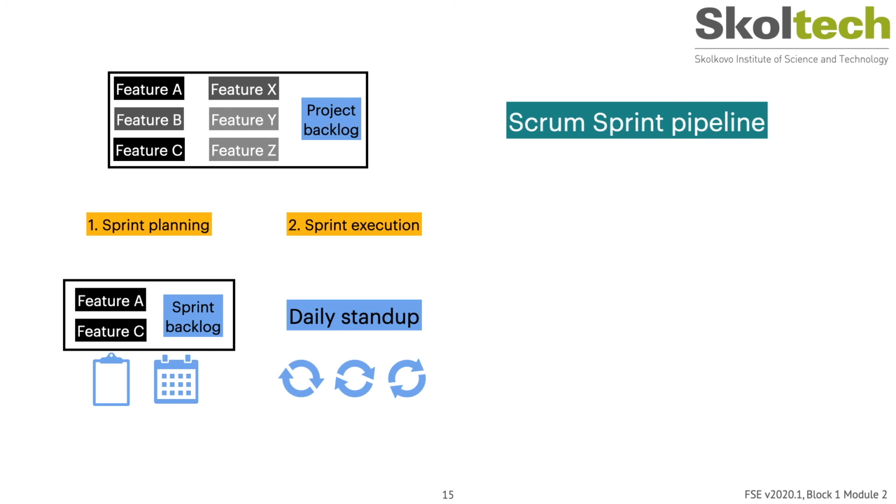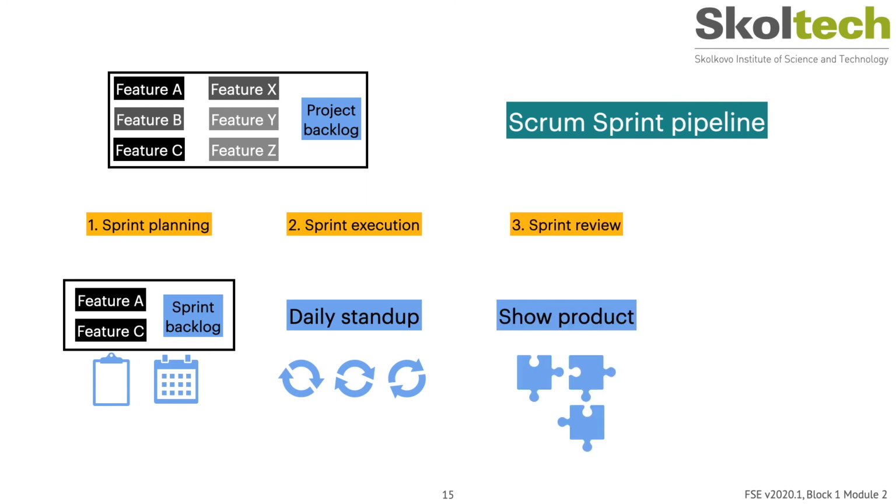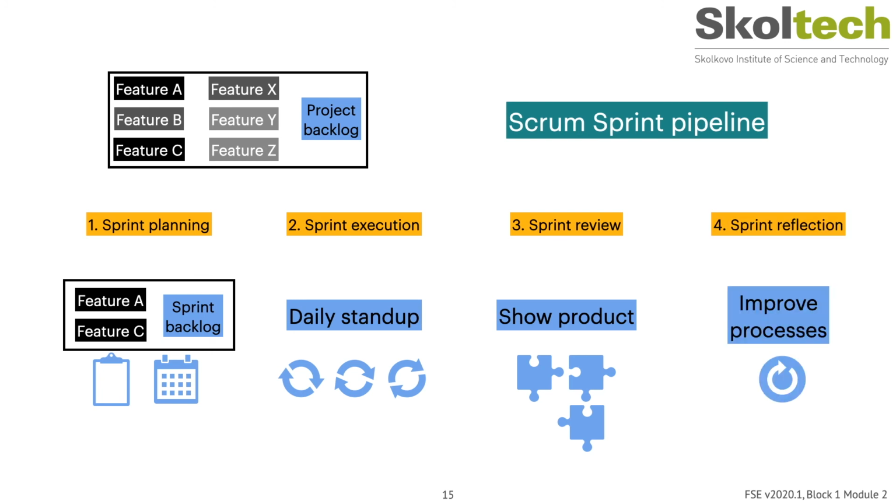As the sprint gets to its completion, a sprint review occurs, where the team and the product owner talk about the product and review the finished work that will accumulate over time into a more complete solution. An internal meeting called the sprint reflection also occurs, where the team talks about the process and how they can be more effective, more productive, or obtain more satisfaction from their work.